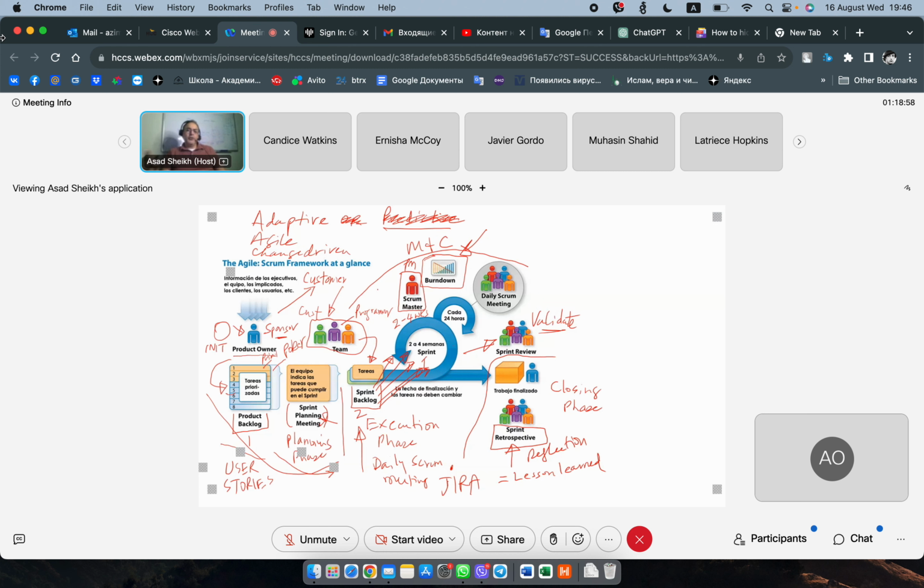So they'll go through each sprint, and they're not going to close it. That would be sprint number 1. Then they're going to open up a new sprint, and that'll be sprint number 2. At the end of the 10th sprint, they are now going to release the product. They are not going to release the product until they have done all 10 of them.